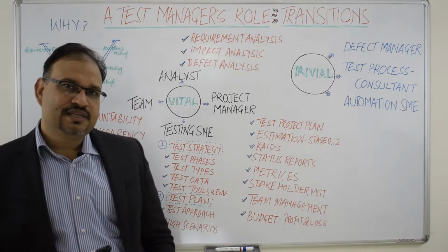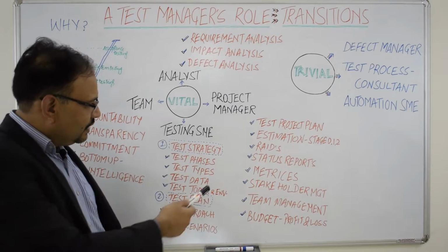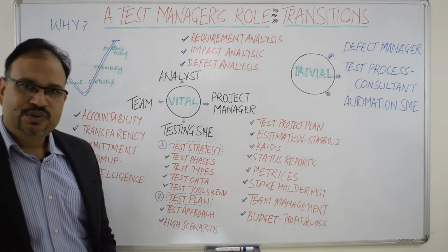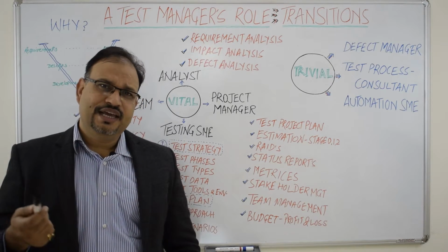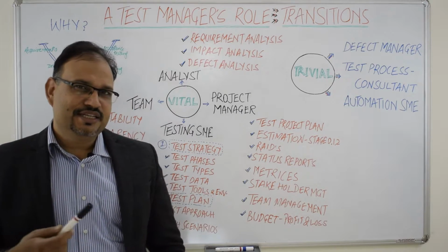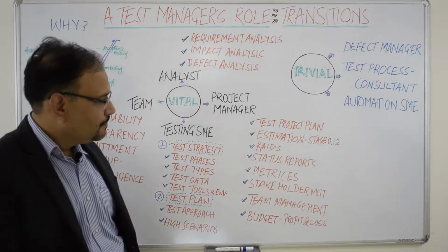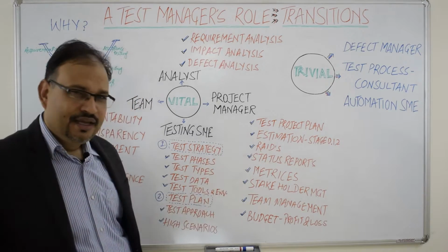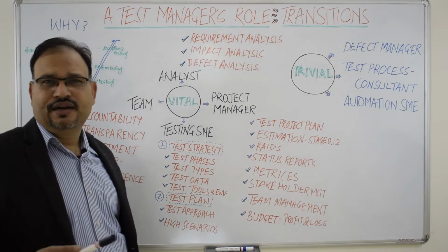Now these percentages differ from setup to setup and organization to organization. Throughout the journey, he maintains a risk log, which clearly highlights the risks, issues, dependencies, and any assumptions being made by the team, with a clear owner and the resolution date. Status reports: he produces daily status reports, weekly status reports, or any other ad hoc reports.